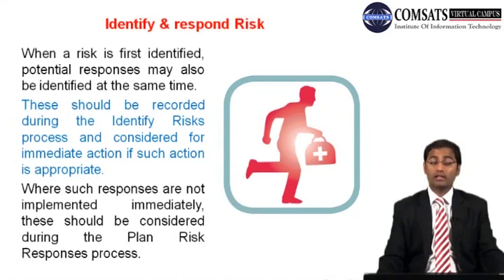So these should be recorded during the identify risks process and considered for immediate action if such action is appropriate. Where such responses are not implemented immediately, these should be considered during the plan risk responses process. So most of the time you are doing good while this phase is concerned, but then at times you want to just let the things go to the next process, and that is qualitative analysis, quantitative analysis, and then you plan responses. So this is good if you have a very good idea what you are going to do at this very process of identifying.